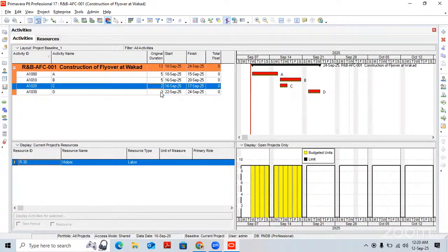No, I don't have a redo option. So through the float we can manage the over allocation up to a certain level. But most of the time in project management, what happens? We directly increase the resources and sort out the leveling issue.